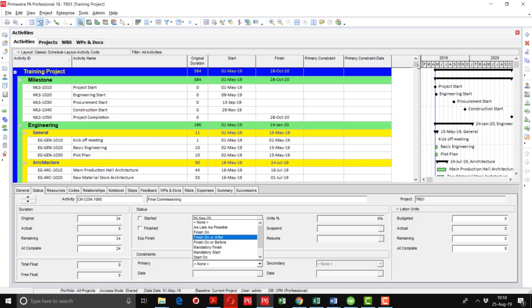So you have to put a milestone in the schedule. If he fails to deliver the slab at the required time, obviously your activities will slip further. If he is delayed at his end, your activities will ultimately be delayed, but your delay is dependent upon other contractors. In this way you can get the EOT from the client. So that is the advantage of the constraint.